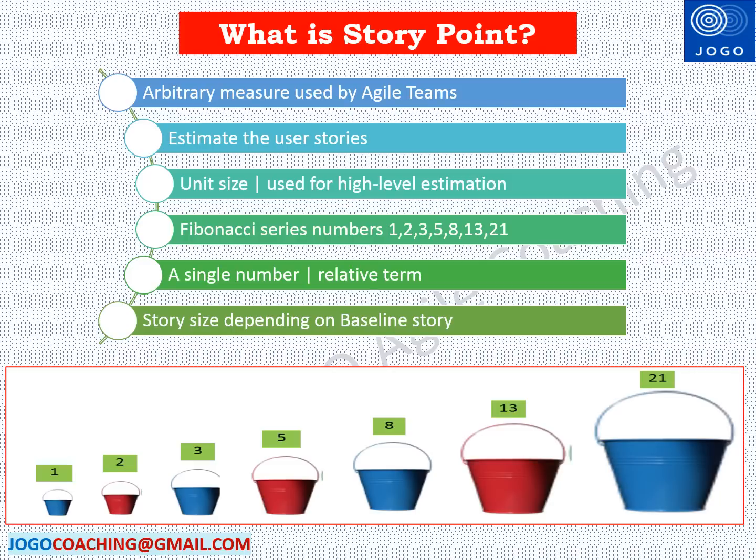Since story point is a single number, team needs to think of a big picture of the user story and consider the story point for each story. Story point is a relative term and it's not directly related to hours. Story size could mean different things depending on the baseline story decided by the team.